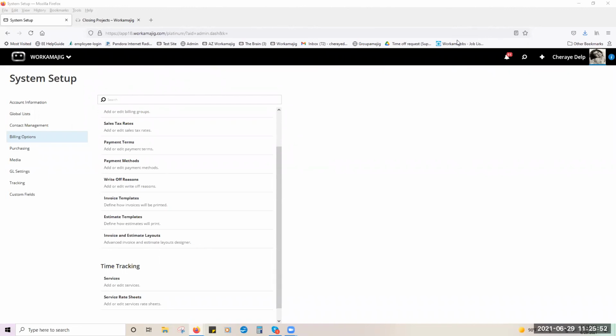Okay, so I guess needed some clarification for Jessica. So, okay, you're suggesting to create a change order. You should do it on the schedule screen and then use the pull from schedule feature to create the change order. Yes, you can do that. And then it'll pull in all of that information for you, all of the changes that were made. Okay. Sorry, that wasn't clear. And let's see. Okay, looks like that's the same question.